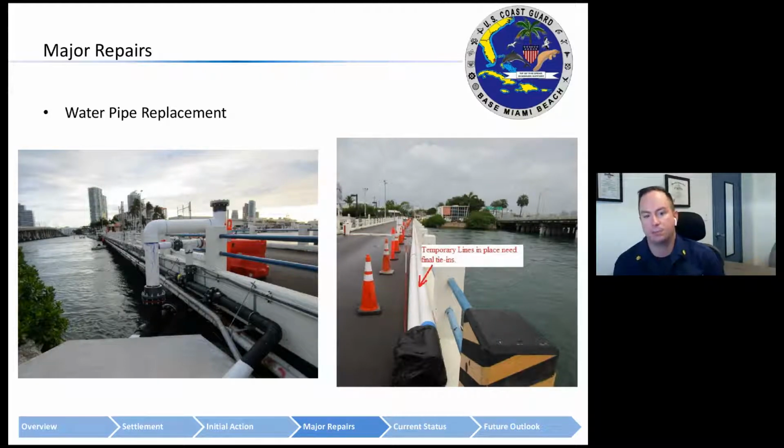Care was taken to ensure this area was coned off and obvious to drivers. Thankfully, during the short window of the install, we didn't have any negligent folks run over the lines, especially the wastewater, and especially considering South Florida drivers. But in hindsight, specifying that the contractor use some sand-filled barricades may have been prudent on our part, and would be something I would look to do in the future. I think we got lucky this time.